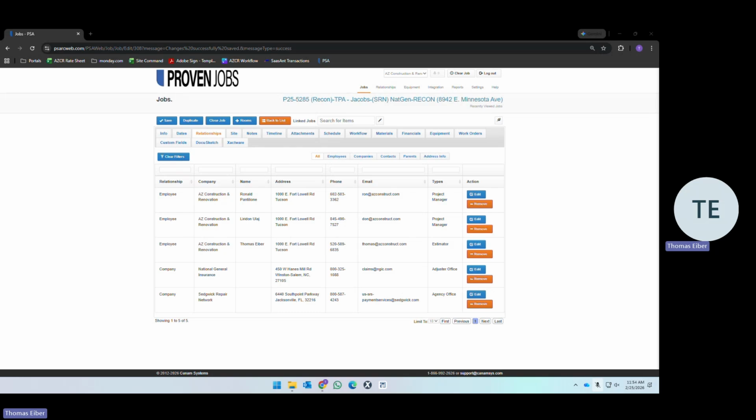Deadlines for those deliverables. We are providing regular progress and field report updates once a week for every job. You're going to be meeting with your project operations manager, providing those regular updates and the field reports also once a week. Change orders processed promptly.